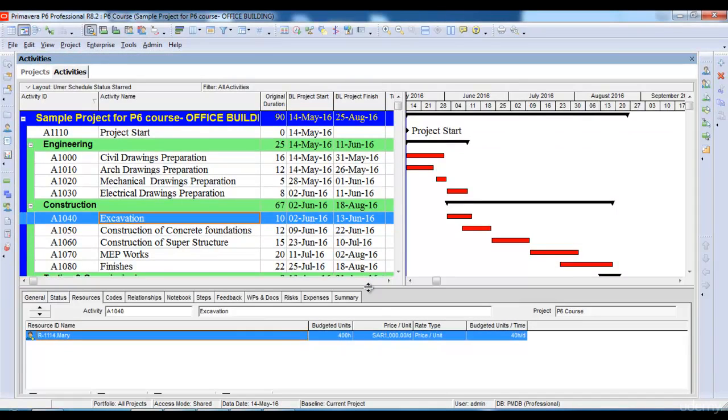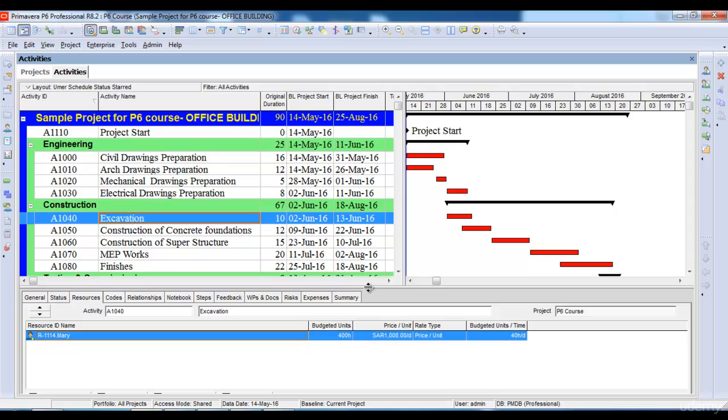Once we have created the project we need to create a baseline in order to measure our progress. Baseline is actually a copy of the original project against which we measure our project progress once the project starts.